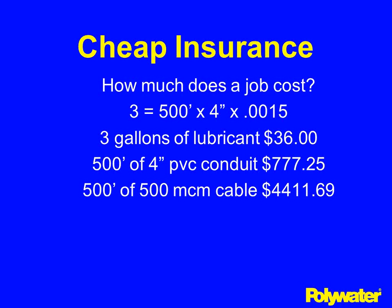How much does cable pulling lubricant cost? It is very inexpensive — in fact, the most inexpensive item on your job. The formula is: length of conduit times the diameter of the pipe times 0.0015 for pristine conditions, or 0.0025 for multiple bends, old conduit, or heavy cable. This works out to roughly one gallon of lubricant per 100 feet of conduit. Three gallons of lube is only $36. Compare that to the PVC conduit at almost $800 and a couple of 500 MCM cables at almost $4,500.